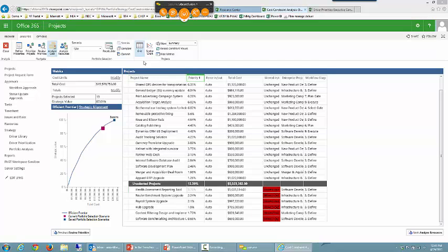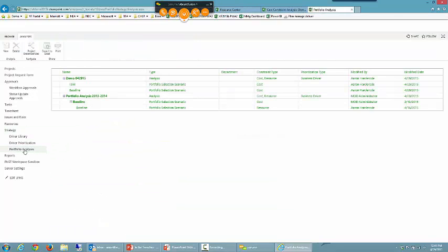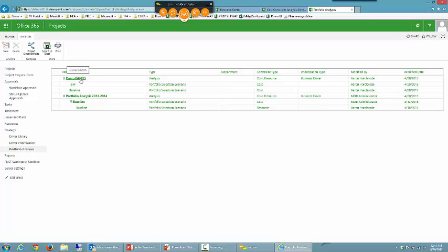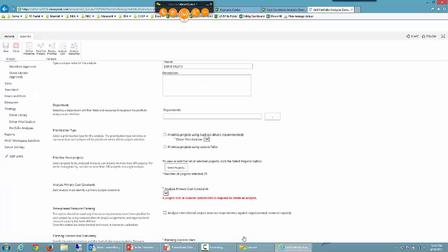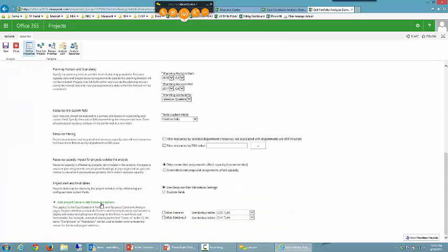Actually, yeah. So on this analyze cost screen here, these projects that it did not select, when you set up the analysis itself, now I kind of overlooked that, but when you come into a portfolio analysis, I'm going to bounce over here to another screen, and if I click back on the page where I defined it, at the very bottom, there is this option here, force in and force out. So if you did want to override what the analysis is telling you should do and not do, you can allow for force in and force out.